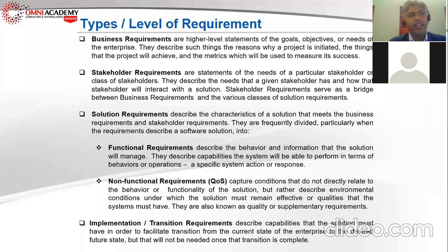We were implementing that application in one of the largest manufacturers in Pakistan, and everything was done. All the requirements and business analysis activities were documented. Singaporean people were there, charging on an hourly basis, and they came here for installation. The training was done, the UAT was done, everything. But when we went to install at the client side, we found that the minimum required operating system for this application was Windows Millennium. I'm not sure you have heard about that Windows, but that was the minimum requirement.